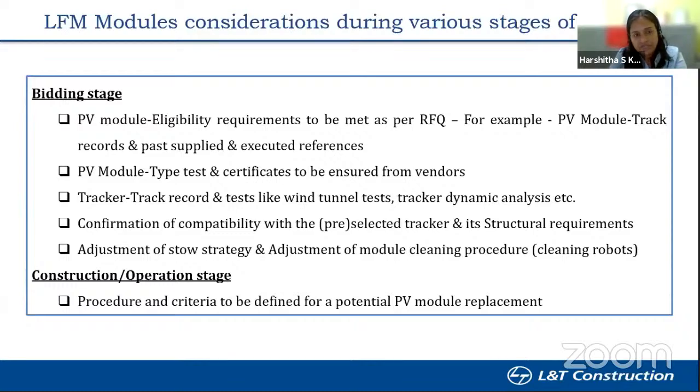Apart from that, definitely we need to do due diligence in terms of the type tests and certificates available from the vendors for the launched large format modules, whether it is available and whether it can be utilized or made available within the period by the time we win the project or execute it.